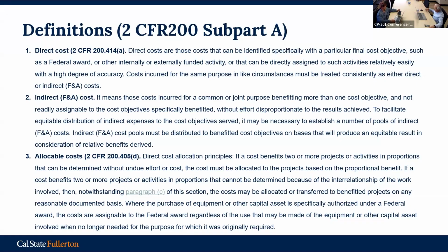So when a department requests renovation for a particular room or set of rooms or a building, they create a job and identify the type of services that that particular client or department needs. So they do the costing, they deploy the number of manpower, number of electricians, anything that they need in terms of trades. Okay, that's the direct cost.